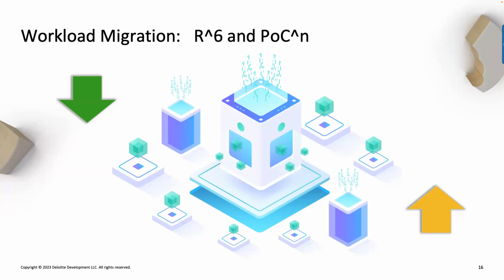Whether you want to rehost it, re-platform it, re-architect it, retain it, whatever, right? So you start looking into these things and say, okay, which ones am I going to rehost? And by the way, there is also reinstall, because sometimes rehost will not cut it for you because you want a golden image and the tool cannot handle a golden image. So it becomes a reinstall type of endeavor.